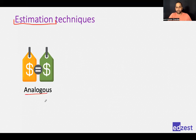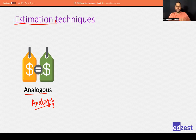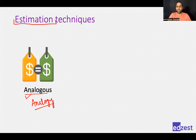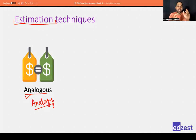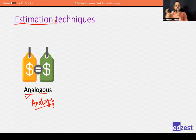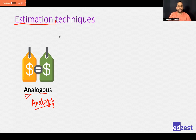The first estimation technique is analogous estimating. The name suggests we are using analogy — looking for similarities. Look at your previous project and see if you have done similar work before; you would know how much time and money it actually took. That actual value from the previous project is a great indication of how much time or money it will take this time, because the activities are similar.